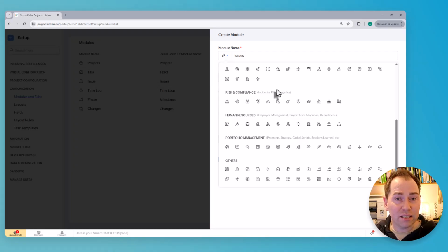And that's fine if the customer wants something done a certain way, as long as I highlight the risks to them. Now I can also use this to create a kind of decision log, or a client decision log, where I can document those decisions that the clients are making, where they're overruling my suggestions. So there's so many possibilities, honestly.